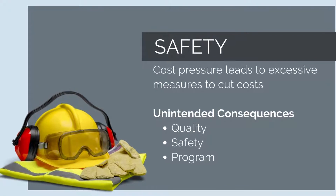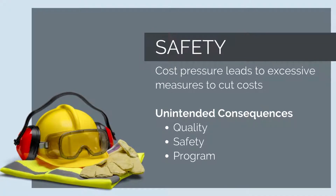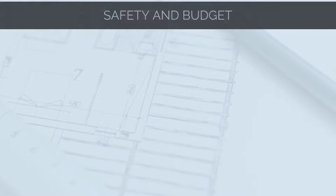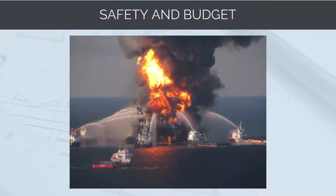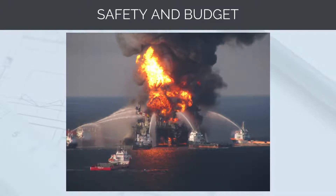When projects are under cost pressure, it leads to excessive measures to cut costs. This can lead to unintended consequences impacting quality, safety and program. Maybe the commercial team will reject a geotech inspection you needed, or you won't be allowed to get additional temporary fencing to secure the site. When projects are under pressure, every expenditure is scrutinised and sometimes poor decisions can be made to save money. A real-life case study of this is the infamous Deepwater Horizon oil spill.